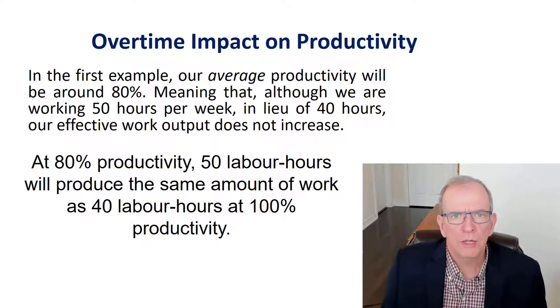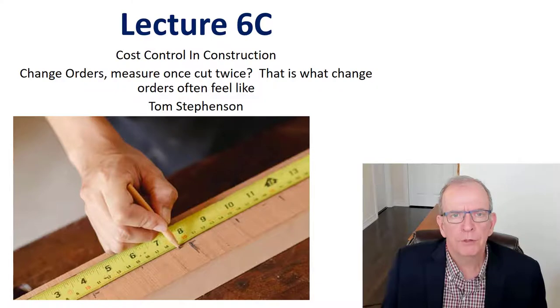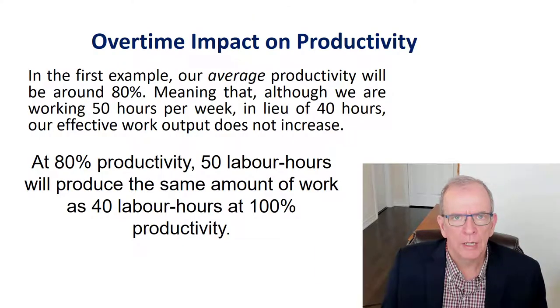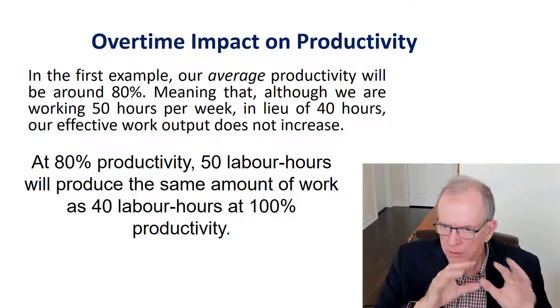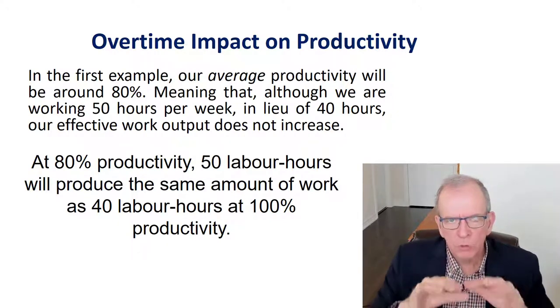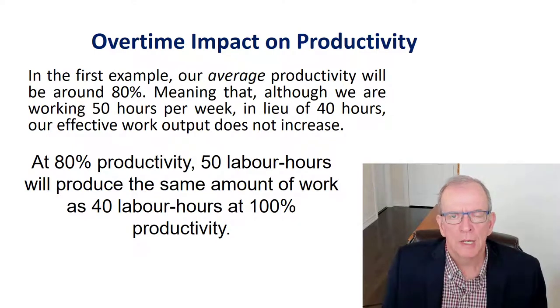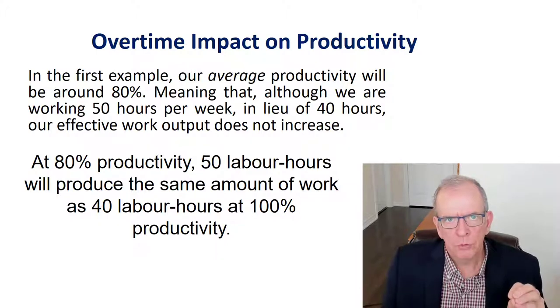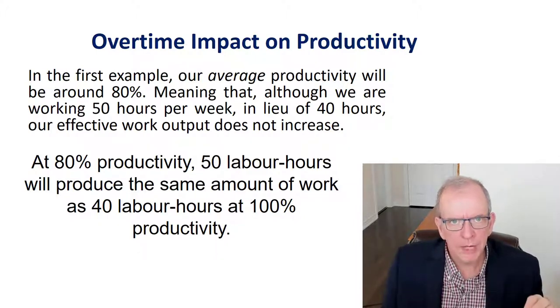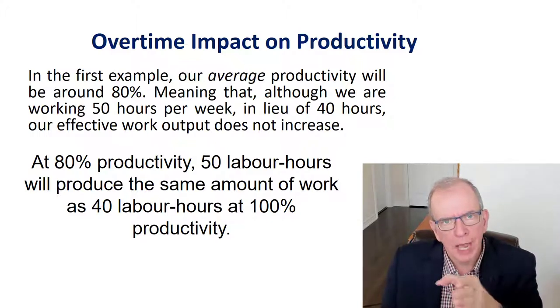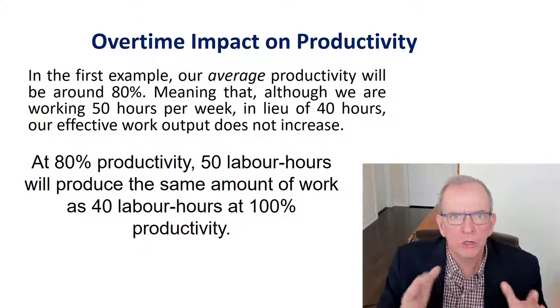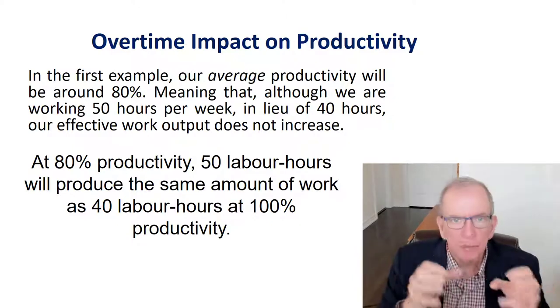We'll be moving on in the next lecture, and we'll be furthering our discussion on the change order impacts. But keep in mind the different ways that it can be viewed, and making sure that it represents the extra effort that you're taking. If you're going to be able to recoup the costs of the changes, you have to be able to break it down. You have to be able to demonstrate how it delays the other aspects of the project. So if we're talking about consequential impacts, we have to be able to show that.